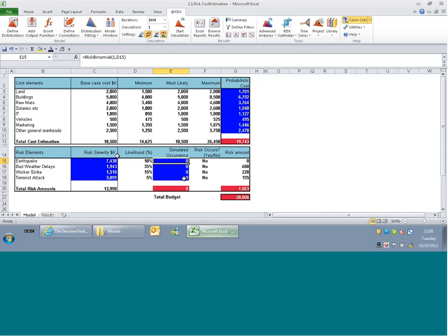And so if I multiply 0 by this, I get 0 here. If, on the other hand, there's a 1 in 10 chance, but that's an average. Okay, so there we go. So now when there's a 1 that occurs there, it gets multiplied by that, and it gets included in here. So this now enables us to really capture this conditional nature of risk modeling. It only gets counted if the earthquake happens. If the earthquake doesn't happen, we don't have any amounts in there.